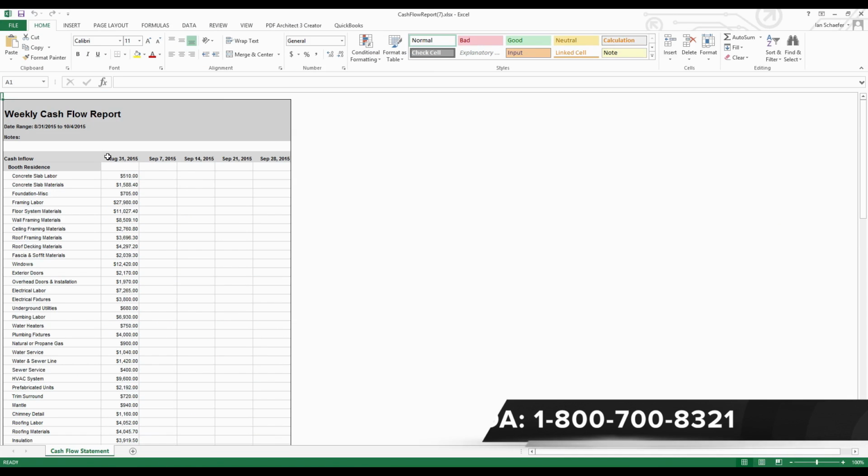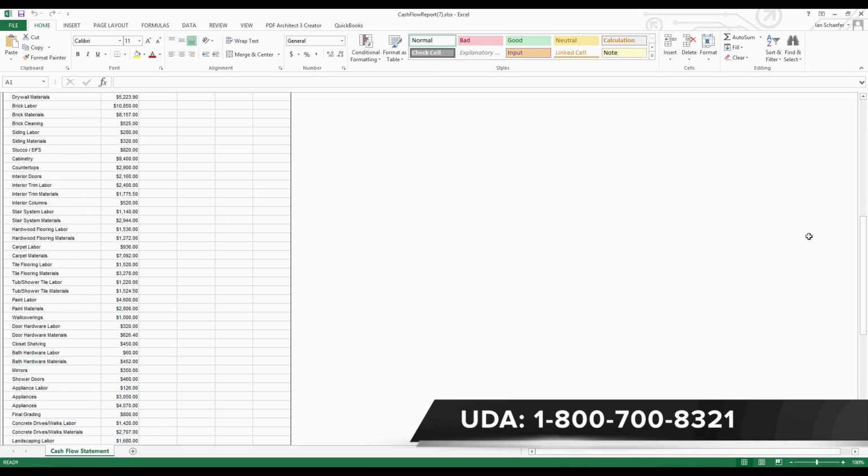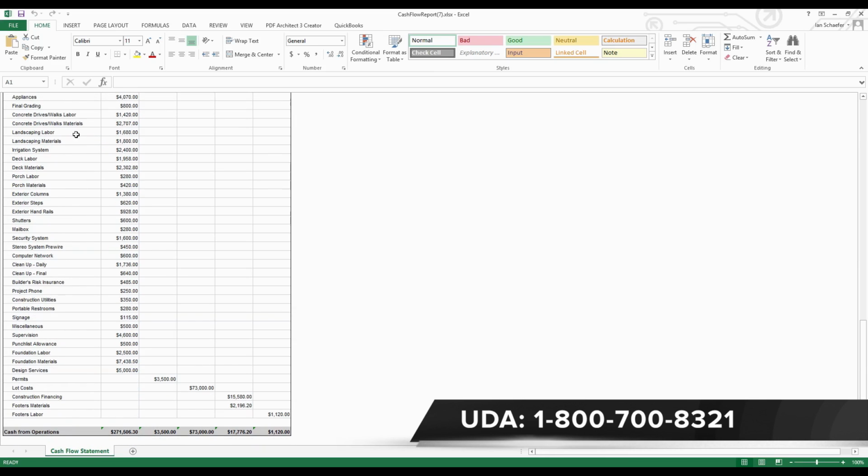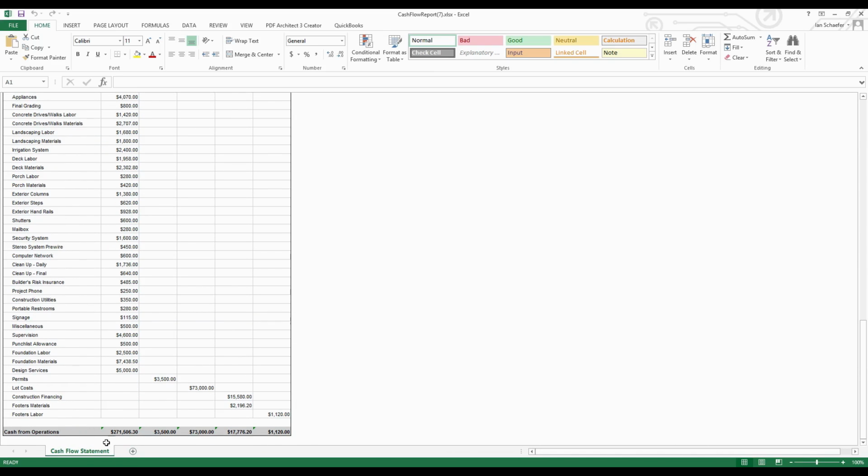So once again, it's going to give me the weeks up at the top, and if you scroll down to the bottom, based on the time frame that I've set up for the schedule, the schedule as it's set right now is going to tell me that I have to spend $270,000 the very first week that we're starting, because I haven't finished the schedule yet.